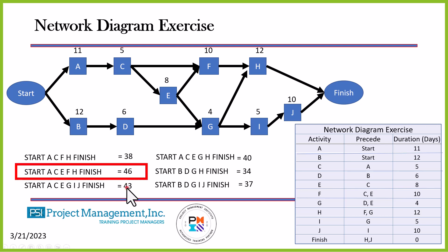I also have a near critical path that I have to watch out for. Near critical paths must also be managed closely, because if anything slips in them, they could soon become a critical path item. It's common for projects to have many critical and near critical paths, and a project manager has to stay on top of all these activities.